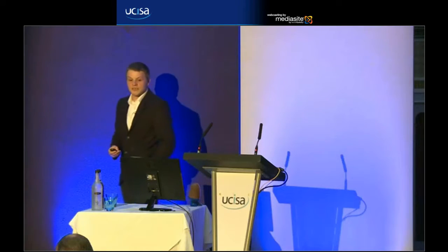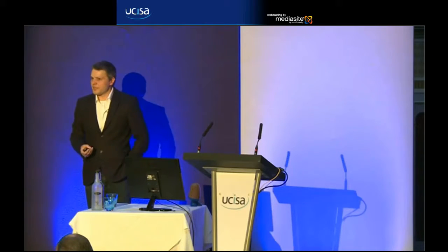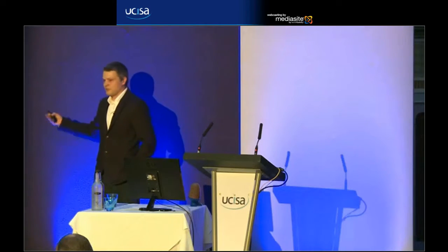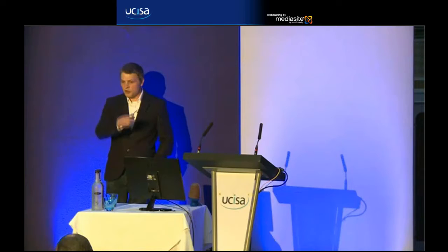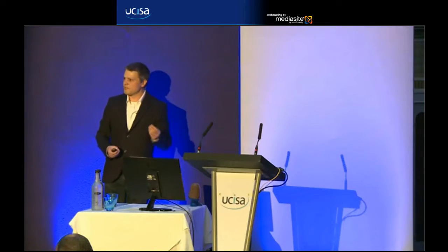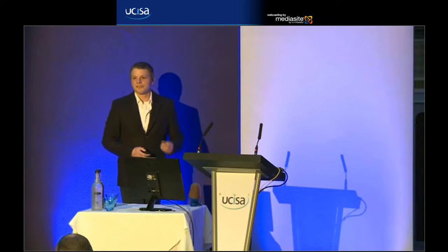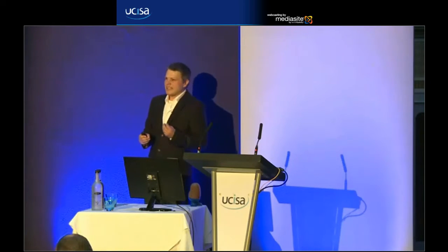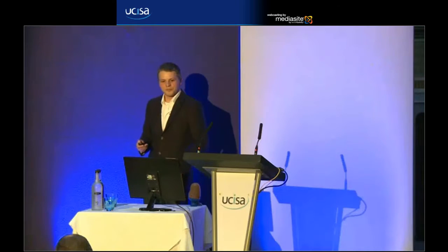M stands for must-haves. These are things that we can't do without. They're critical to the project delivery. The project has effectively failed if we don't deliver these ones. So we go through with the customer, through all the stories, and we say, which are the must-haves for this project? The should-haves are very important. They're key functionality. They can be key things, key parts, key deliverables of the project. And we really want to have them in there. At a push, you maybe could go without it for a bit, but you're going to want to do it very soon.